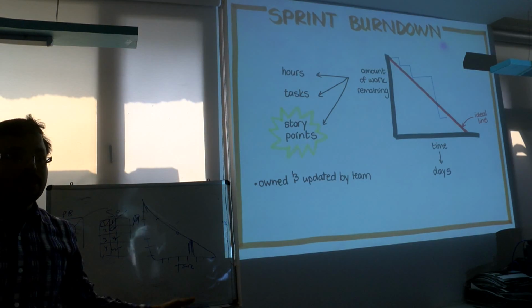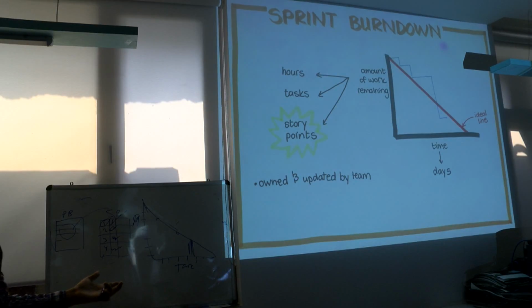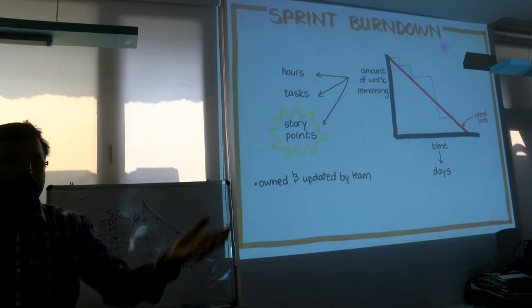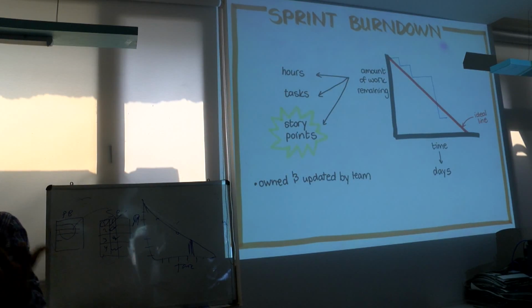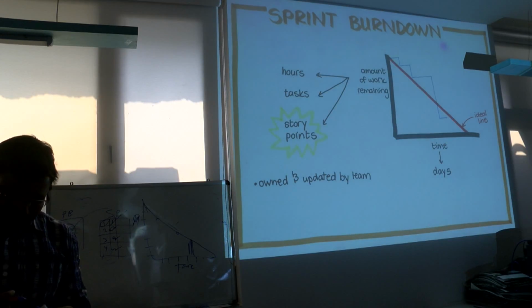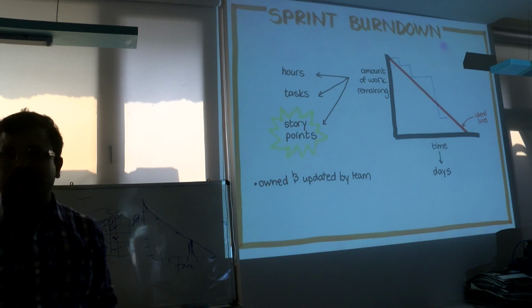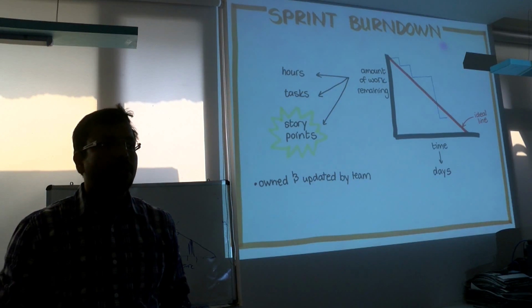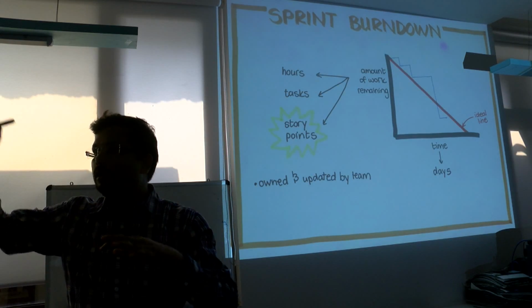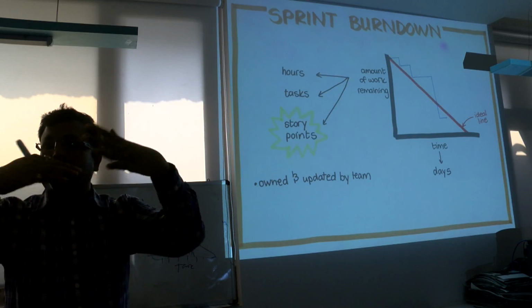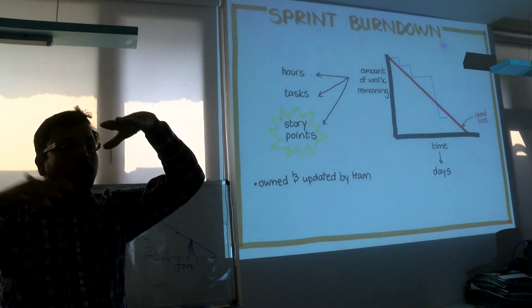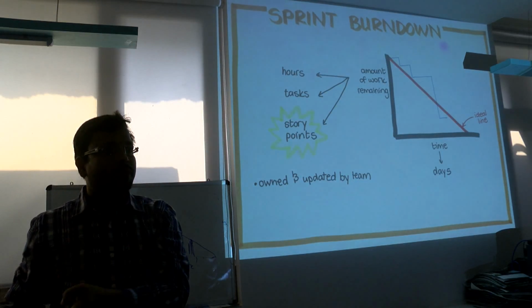Remember another chart as per the Scrum perspective, a sprint burn up chart. A burn up chart will tell you how much task you have done. In general, the client generally asks the Scrum people two very useful questions: what is the difference between a sprint burn down chart and a sprint burn up chart? Burn up means whatever we have done so far. Burn down means how much is still remaining to finish the sprint.